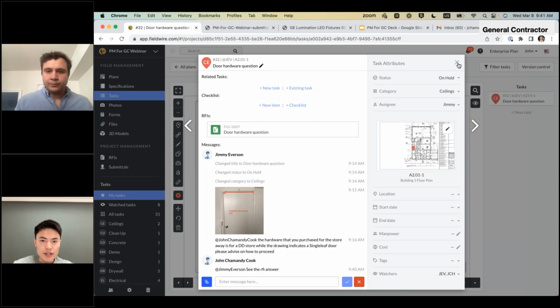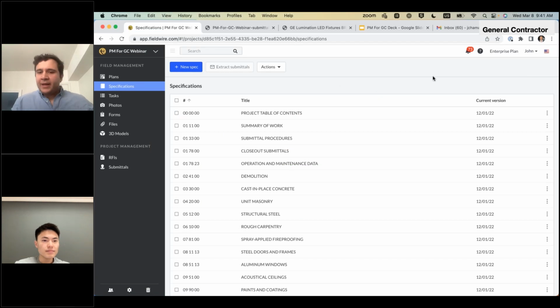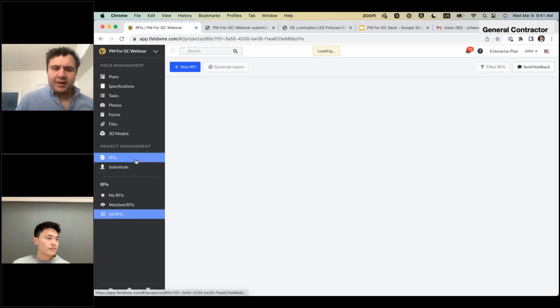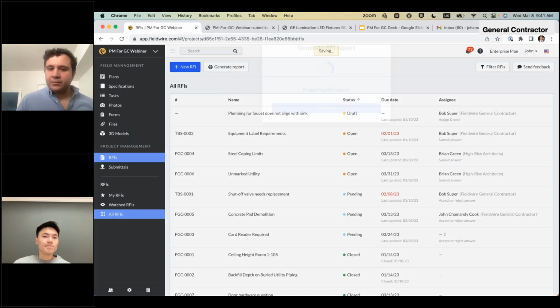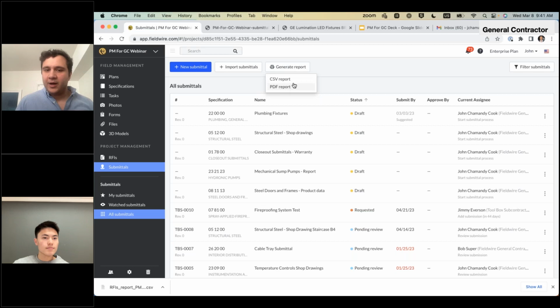Sweet. And this question is related to specifications. Can I upload revisions to specifications? Yes, absolutely. So again, a lot like plans, if I just dump some new spec book in, these will all get revised. You'll see this current revision date essentially change to the date that you uploaded them. Awesome. And another one is, can we see a copy of the RFI and submittal log? So a copy, meaning when we're talking about PDF, again, in generate reports, I can generate the RFI log. I can do the same thing with the submittal log as a CSV or PDF. So as a snapshot.